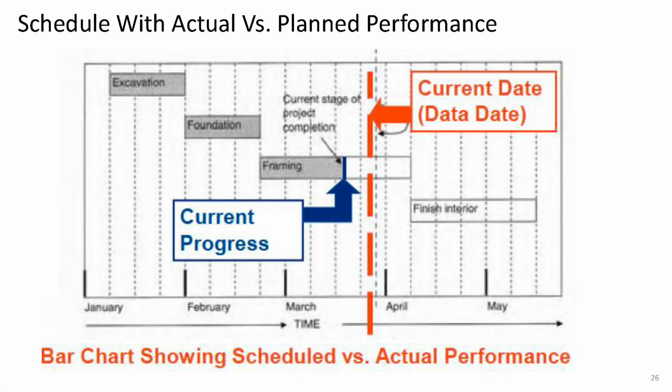Another popular format for bar charts is to integrate actual project performance data, like the percent work complete for each activity, into the as-planned schedule. To show the actual progress, you can shade the bars to reflect how much work is done. For this type of schedule, you typically add a red vertical line to mark the current date. It is basically the time when you evaluate the project status, like at the end of April in this example. This schedule is often called the updated schedule.